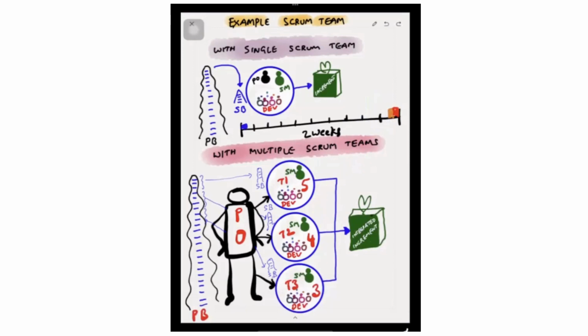they can keep continuous integration, like every 1.5 days or 2 days, they can keep some integration touch point for a couple of hours wherever there is a dependency. For example, team 1 has a dependency with team 2 through one item. So when both are done, the respective team members of team 1 and team 2 can get into a meeting room, complete the integration and go back.